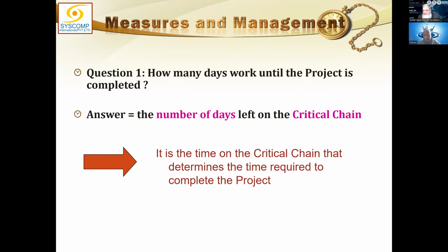Because for the customer reporting, project buffer is part of the project. That is an internal control that we are exercising, the project buffers and feeding buffers. But when we have to tell the customer how much more time we need to complete the project, we would tell the actual estimate of the buffered activities plus the whole remaining buffer, right?